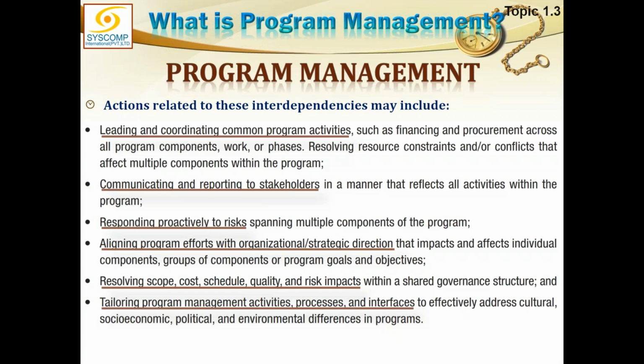Then, if there are any resource concerns, because program management actually will act like a portfolio for its components, the distribution of resources is going to be the responsibility of the program manager within the program. Whatever resource pool has been allowed to the program manager will be further distributed to candidate projects within the program. So resolving resource constraints and conflicts that affect multiple components within the program is the responsibility of the program manager.